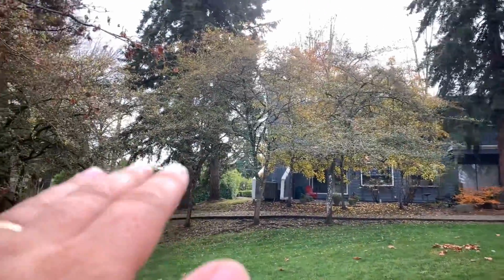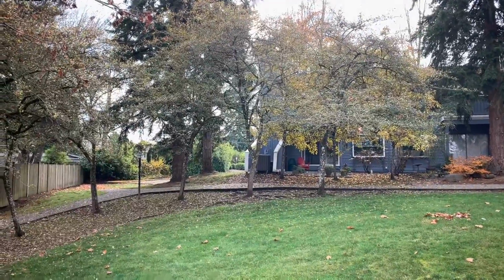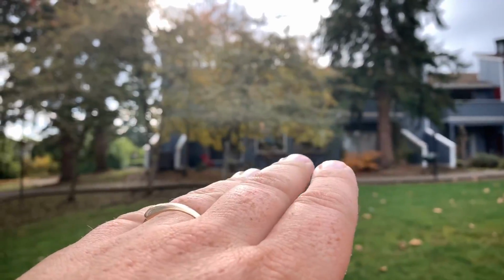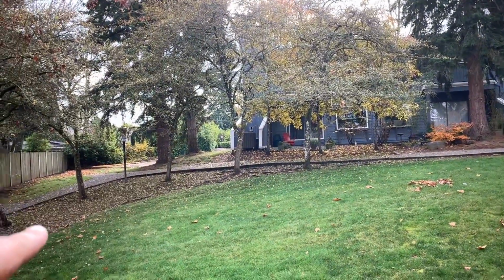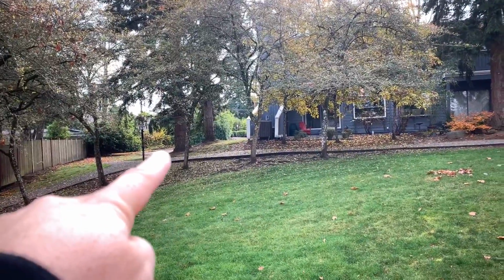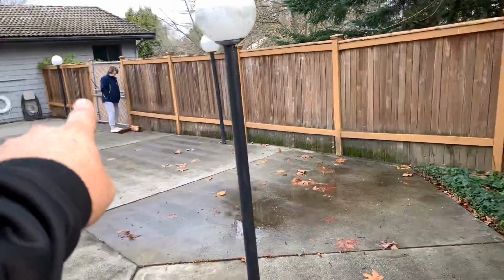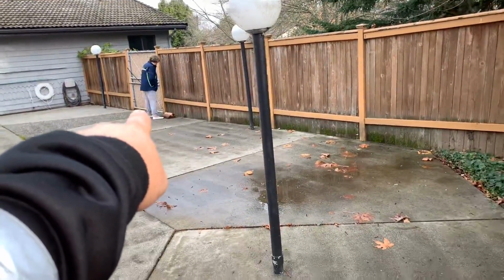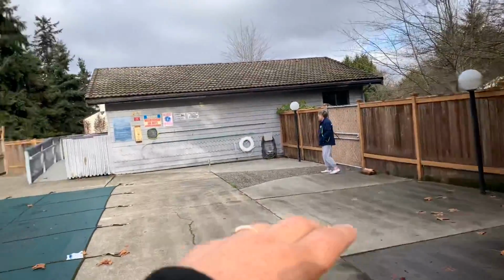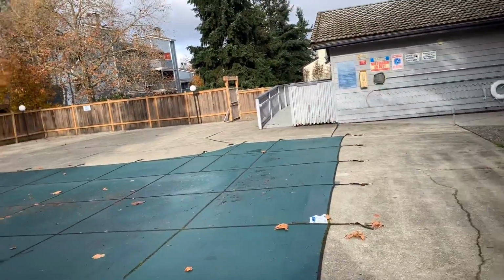quickest, easiest access is from the southeast part of the property. There's a parking lot near the A units, and there's a sidewalk that comes in probably about 120 feet from the parking lot, comes all the way in around to the back of the pool, and there's a nice wide open, about 6 foot wide gate that we can prop open to bring in concrete.